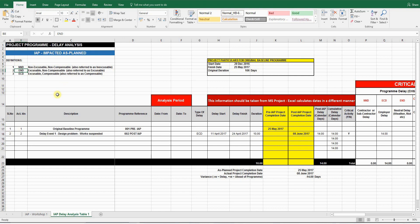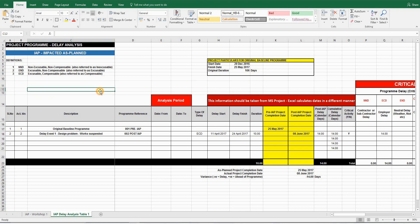This is usually caused by weather or any event which is not caused by the contractor or the client. And finally, you have ECD, which is an excusable and compensable delay. Also referred to simply as a compensable delay. This is a delay caused by the client, and the contractor is entitled to an extension of time and recovery of prolongation costs.